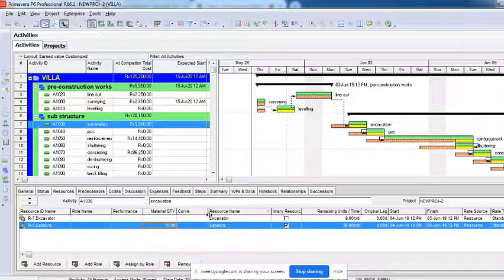So what you do is create a project. Anyway, by default there is a calendar for that. Then you create WBS, then you create activities, then you start giving your relationships, then you create resources and start adding the resources to it. But then you will start finding lots of problems. The time is not being taken properly, the cost is not being taken properly. You are telling it 5 days but it is taking something else.